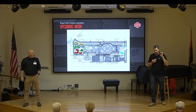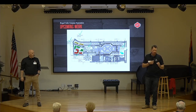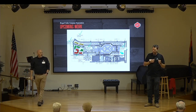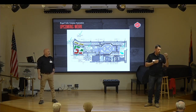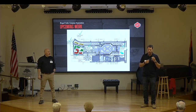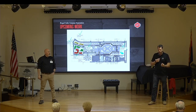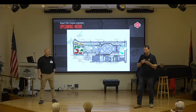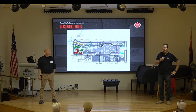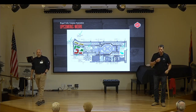But I do apologize that you guys have to go through that. We don't mean to, but that's part of our testing system. You will also have the same experience, and unfortunately, more people will have to deal with that. The residents that move into D will also hear that when we start up building E. The good news is E is a lot quicker to test than building D because it's just half the size. And like Sean mentioned, there's no community rooms, no storage rooms, no electric rooms, no IT rooms, no trash rooms. That's 17 different rooms that we don't have in the E building, so it'll be faster on the turnaround.